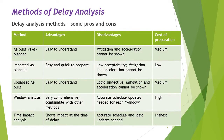Looking at some pros and cons. For As Built versus As Planned: it's very easy to understand. It has the disadvantage, however, that effects of mitigation or efforts of mitigation and acceleration cannot be separately identified and shown. The cost of preparation is medium.